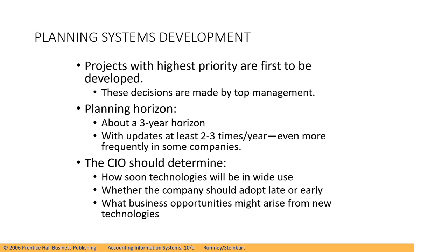In planning the system, projects with the highest priority are first to be developed. These decisions are made by top management. You also have some planning horizon — maybe a three-year plan or five-year plan, depending upon the management — with updates at least two to three times a year, even more frequently in some companies. The chief information officer or CIO should determine how soon technologies will be in wide use, whether the company should adapt late or early, and what business opportunities might arise from new technologies.